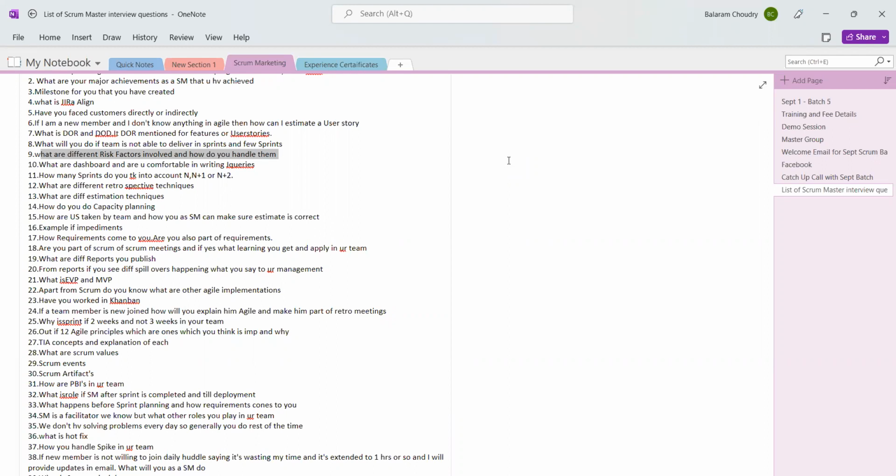So how do you plug the loopholes? You take the backup plan. If a particular person is working on a critical item and happens to be on emergency leave, who is the backup? This is the first mitigation plan. Then take the commitment from the dependency team. And what else? If development work is done, validation needs to happen.